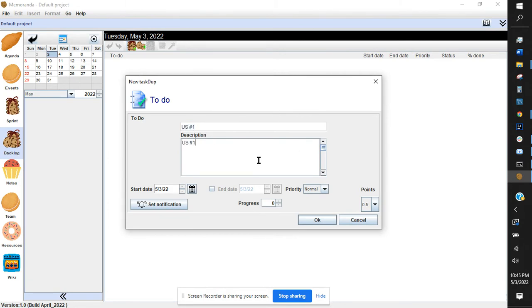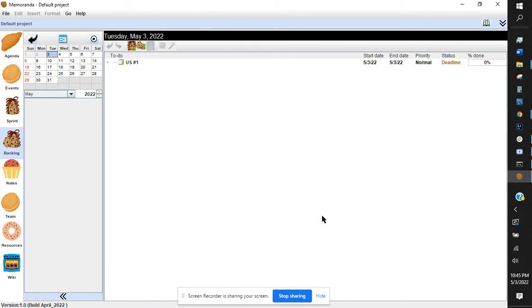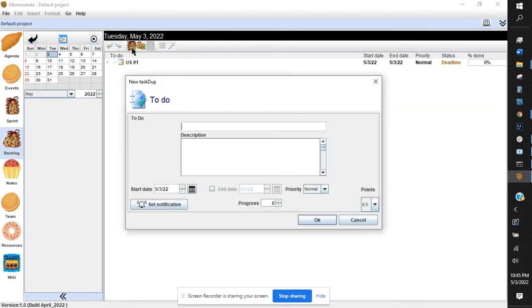The most important difference you'll see in our new user story is this point system. What we wanted to do was pivot away from using a nominal ranking, to a Fibonacci-based point system, just to rank the user stories here.